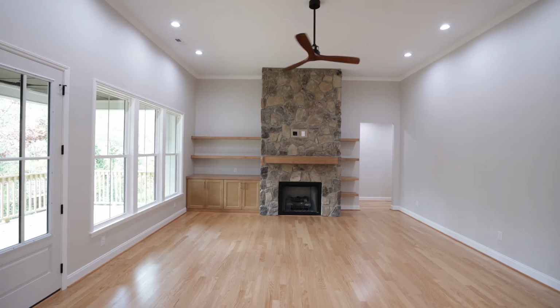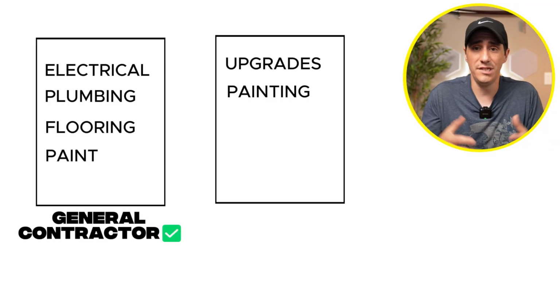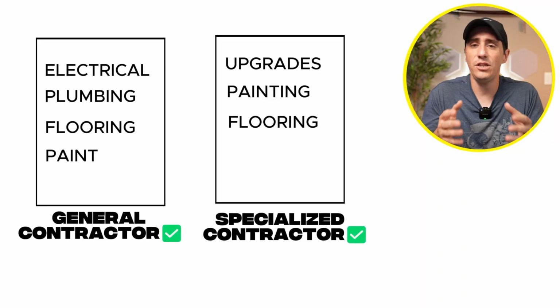They're gonna specifically do things like painting and flooring, countertops, appliances, and they're gonna help you to manage everybody. But if you just have some small upgrades and maybe you just need some painting or some flooring, then you're gonna wanna go with someone very specific who focuses on that. This is gonna help you save money because a general contractor is gonna charge you a little bit more because they need to get paid as well.